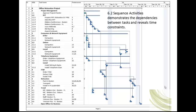Two important concepts to consider when determining dependencies. One, apply dependencies to the lowest level task only. Notice only the tasks at the lowest level of the hierarchy have predecessors assigned to them. Two, tasks inherit dependencies from other tasks. Do not list dependencies that are inherited. For instance, before the task install computers can be performed, install wiring and install network must be completed. The WBS indicates install computers has a dependency of install network but not install wiring. Install wiring is a dependency of install network and is inherited by install computers.